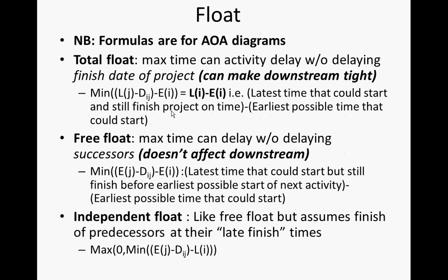In an earlier version of this class, I used to talk about several notions of float. There's three fairly common ones. I do want to distinguish these a little bit. The most common one of all, by far, is total float. This is the maximum time an activity can be delayed without delaying the finish date of the whole project.